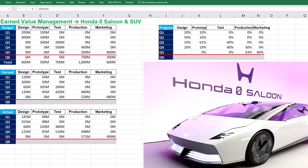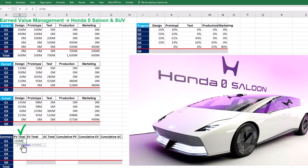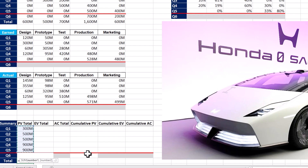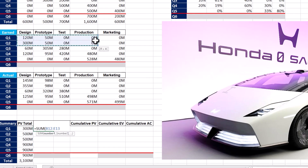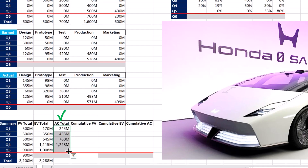We now need to summarize our data to evaluate the performance measurement baseline or PMB within the context of project controls. First, we should find the total planned value for each quarter by summing up PVs for design, prototyping, tests, production, and marketing in Q1. The formula is then replicated for other quarters and the total figure at the status date or end of Q5 is calculated. We follow the same procedure to find the total earned value for each quarter — the total earned value is $3,288 million by the end of Q5. In the same way, the total actual cost for each quarter is found, totaling $3,754 million by the end of Q5.